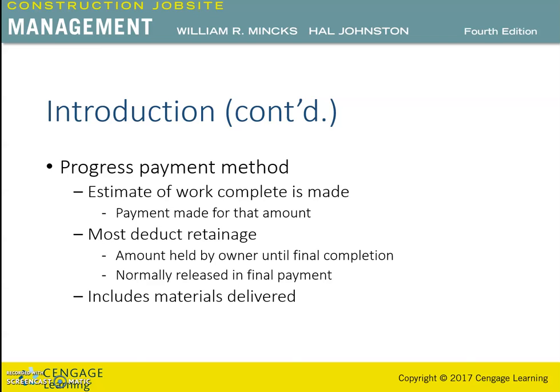So some reluctance may occur on the owner's part in paying for the material stored off-site that could be used for other projects, such as non-fabricated and generic material and lumber. So the owner's primary concern with stored material is whether it will eventually be incorporated into the project.